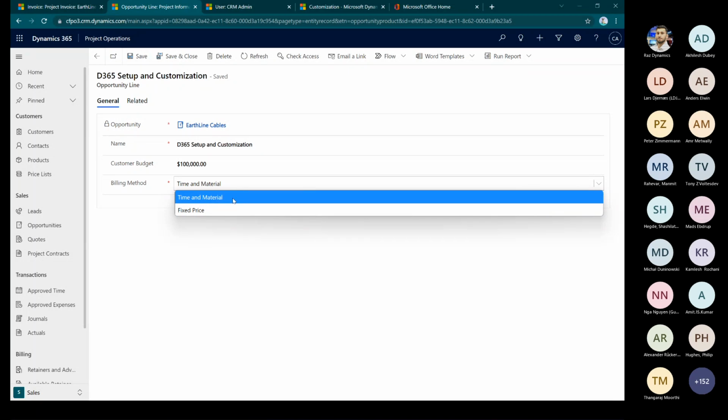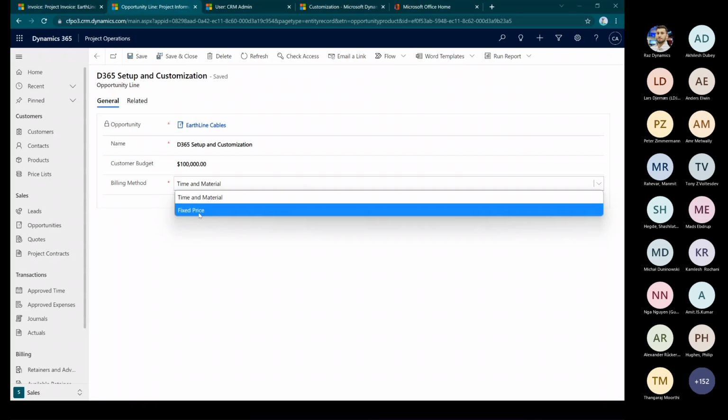of the invoice. If, let's say, for any other opportunity, I don't have a time and material, and I just use a fixed price, time will not be included even though users enter some time. But what will happen is a fixed amount of the cost will be added to the invoice. So I'll get to the invoicing piece and I'll talk about how time entries are considered and not considered.